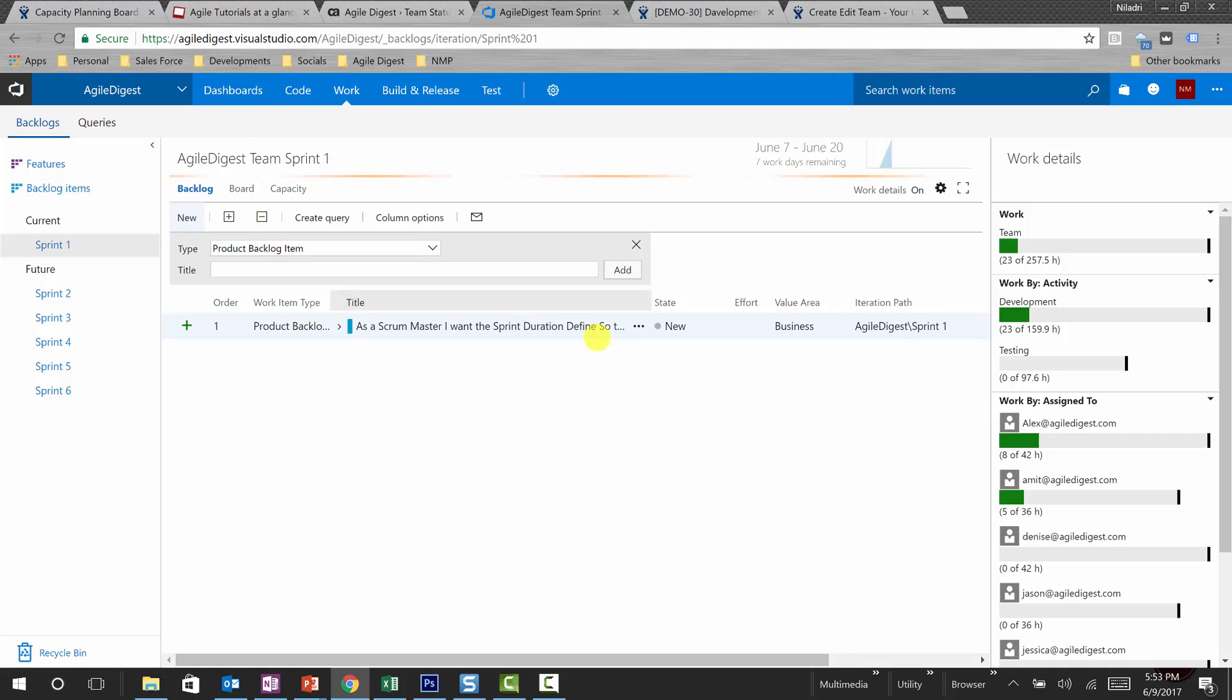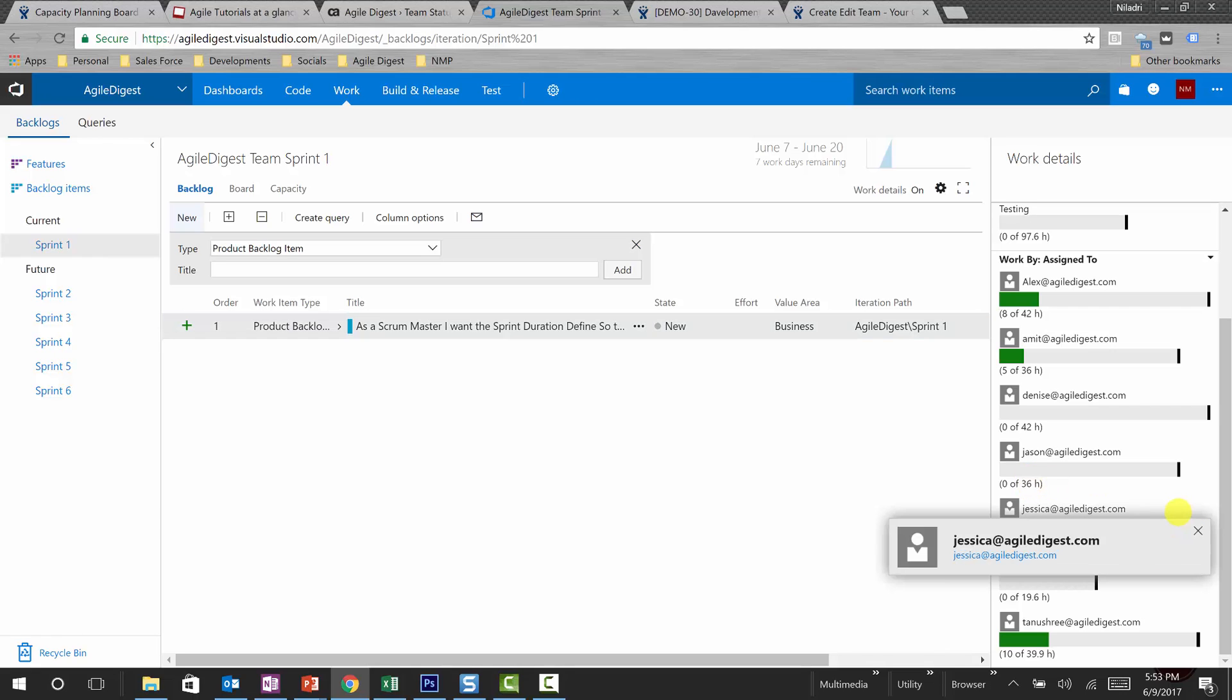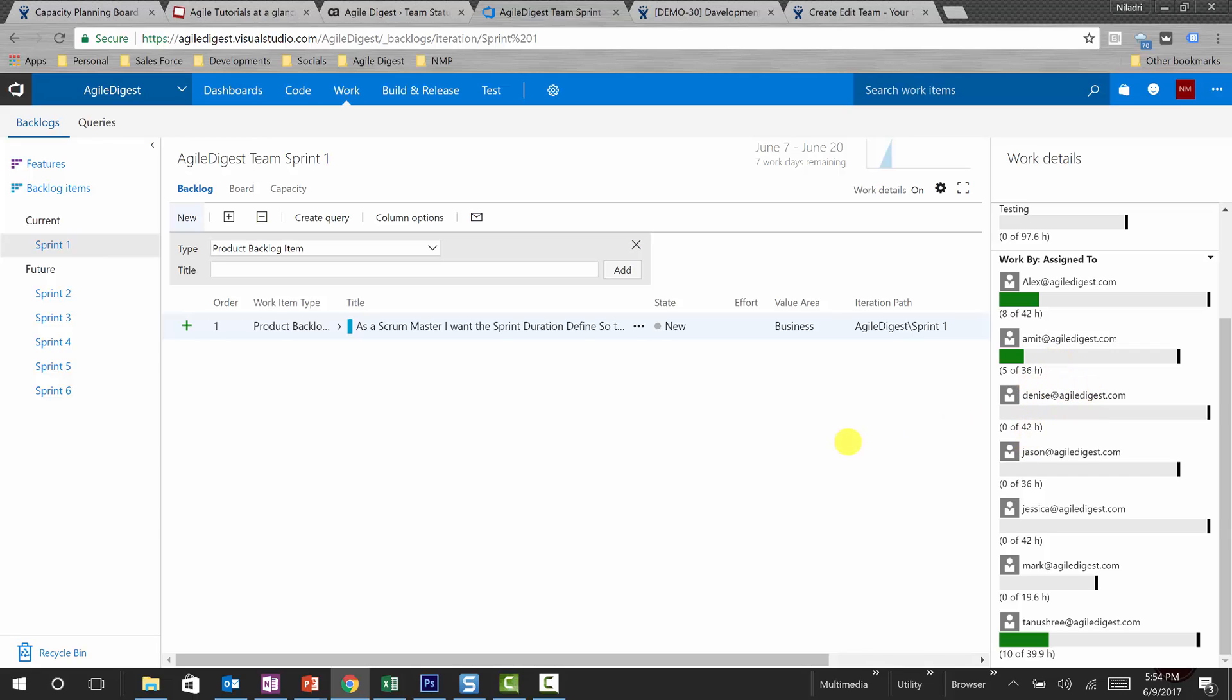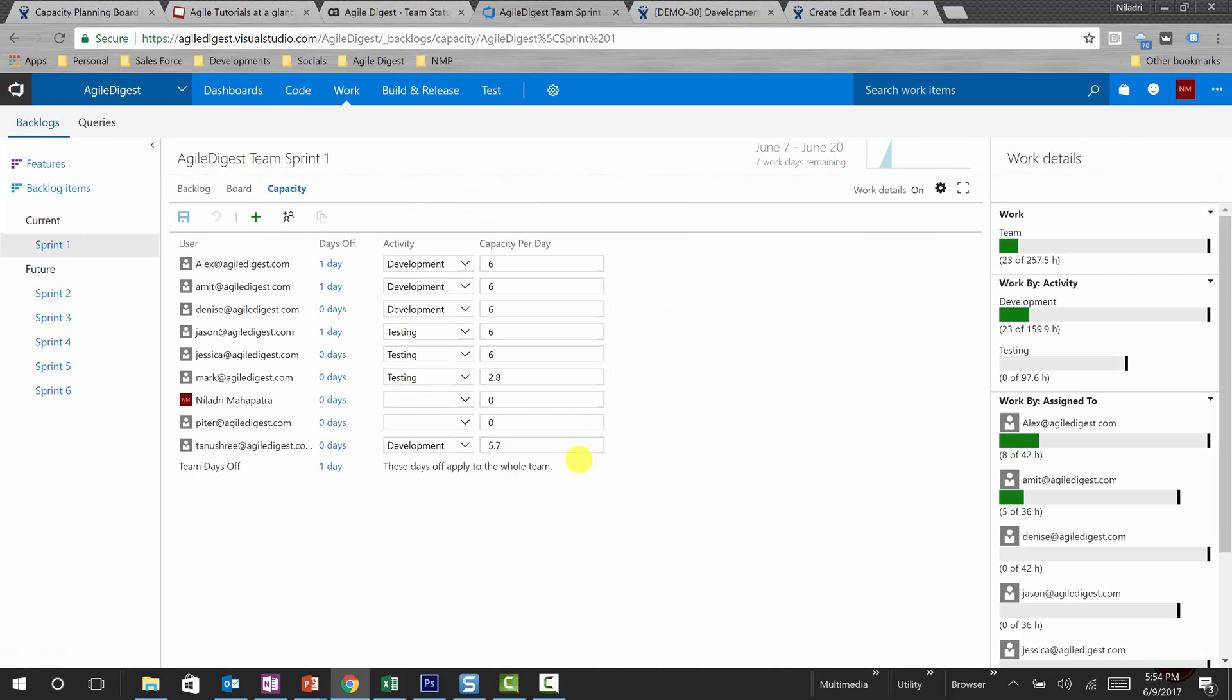Now go back to your item. Now you will be able to see if you go into backlog here. This is one story for the sprint, but you can see Amit also has got some bandwidth. It will be turned red if these hours cross beyond this limit. Everyone is saying 42, 36, 42, 36. This is based upon every day's calculation, and as of today is 36 hours remaining for Amit and 42 hours remaining for Tanushri. Tomorrow it will be reduced in that way.